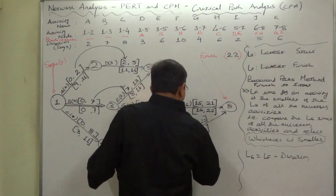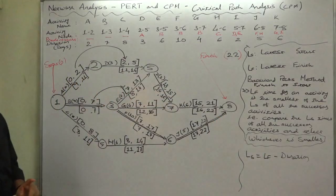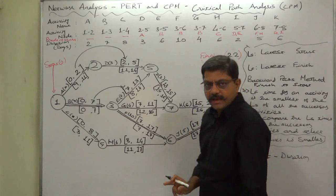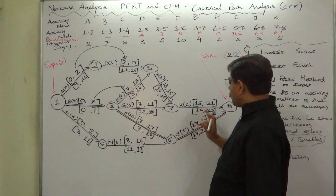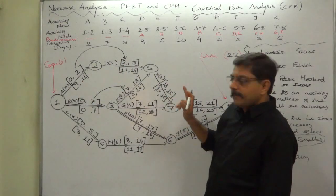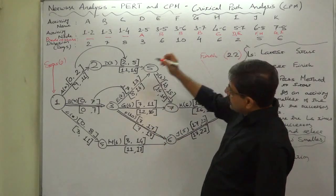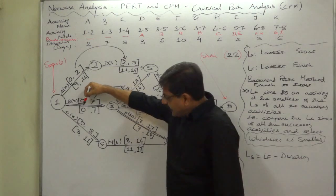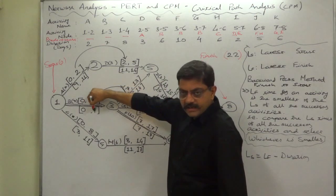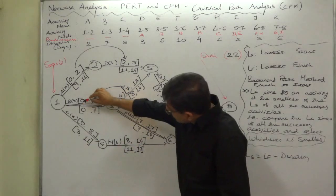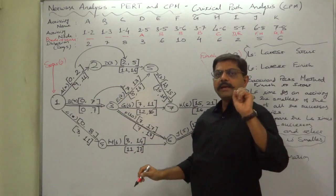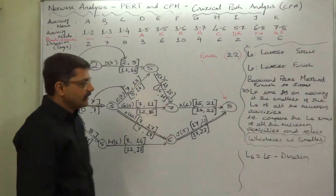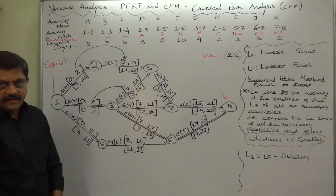This is another method of determining the critical path - by comparing earliest start and latest start times (both should be equal) and earliest finish and latest finish times (both should also be equal). If both pairs are equal, the activity is a critical activity. There are three critical activities: B, F, and J. In this way we can determine the critical path. Thank you very much.